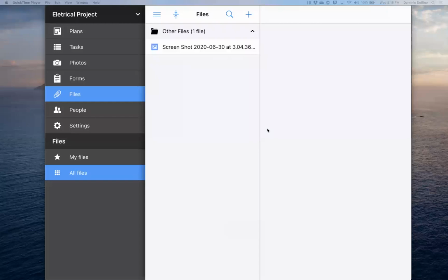Right now, we have some of the admins doing that here, so you guys won't have to do anything. Let's say we're on a new job and we get the 100% construction drawings. We load them in there, and two weeks later, ASI 1 comes out. The admins will slip sheet that right into the job for you. Then you'll be able to see the current version, old versions, and overlay them like Dominic showed in the last session. So you guys won't have to worry about that.